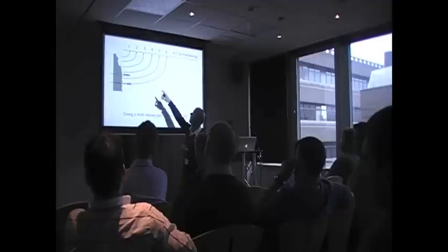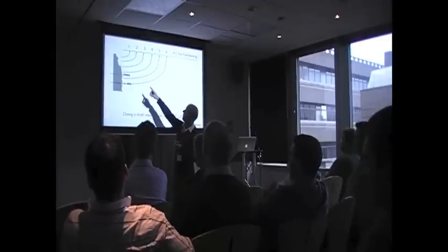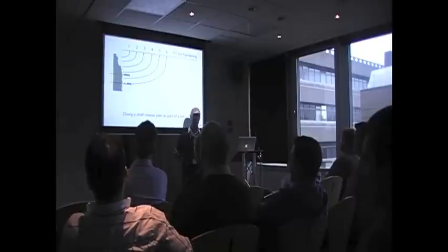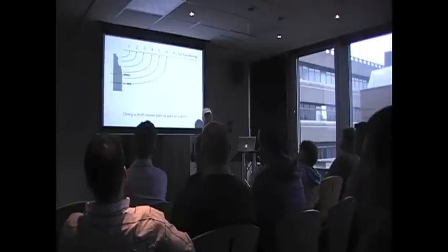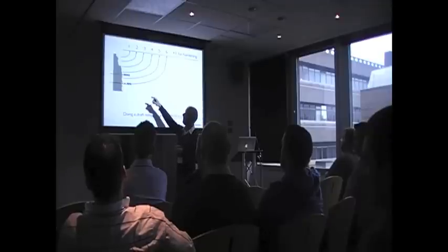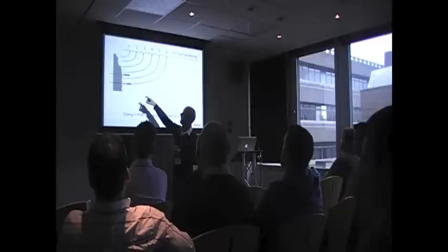So it's kind of a proof diagram. Working out the small, medium, and larges, we figured out that to get to that MMS level we need 4.5 sprints' worth. We do 1-week sprints because none of our projects are that big. You could have 2-week sprints if it was a large project. And then we pick another 40% of the stories underneath, and we know that to do that extra 40% is going to be 6 sprints' worth.